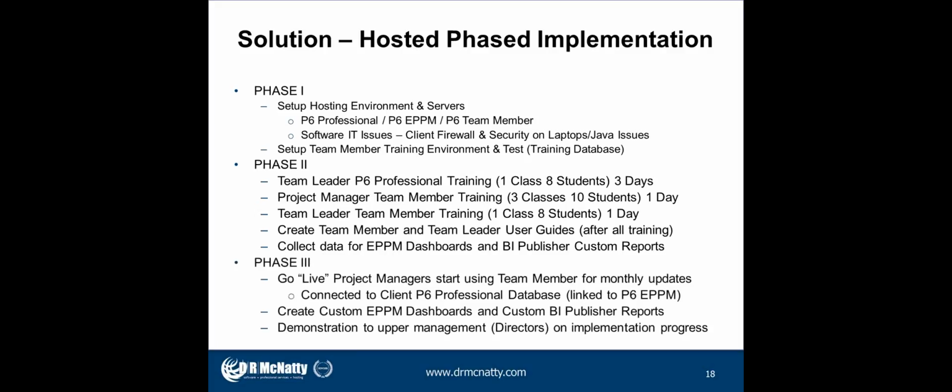Phase 3 was going live with the project managers to start using Team Member for their monthly updates and not use the Excel sheet. And that required us connecting to the client P6 Professional database, which was then linked to P6 EPPM. Then we needed to create custom EPPM dashboards and BI Publisher reports.